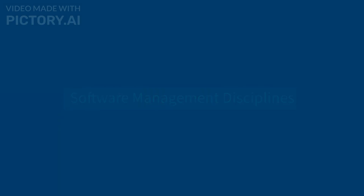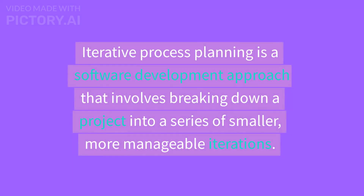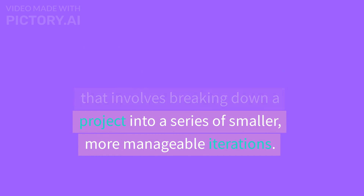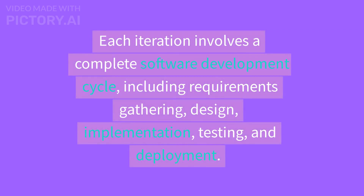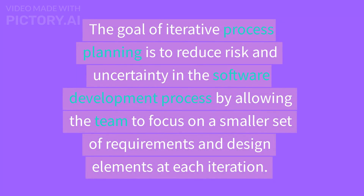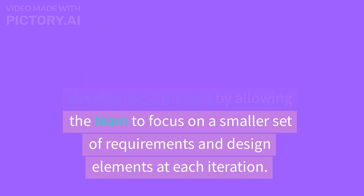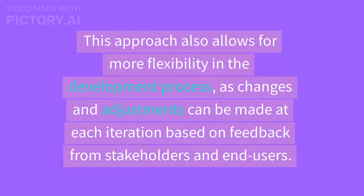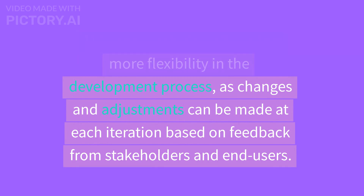Software Management Disciplines: Iterative Process Planning. Iterative Process Planning is a software development approach that involves breaking down a project into a series of smaller, more manageable iterations. Each iteration involves a complete software development cycle, including requirements gathering, design, implementation, testing, and deployment. The goal is to reduce risk and uncertainty by allowing the team to focus on a smaller set of requirements at each iteration. This approach also allows for more flexibility, as changes can be made based on feedback from stakeholders and end-users.